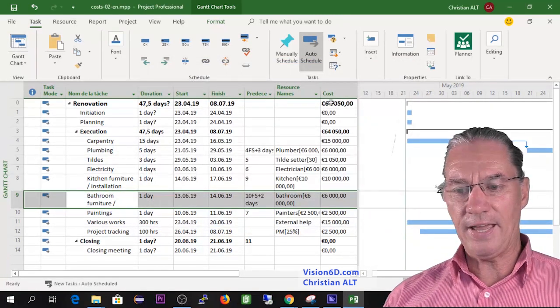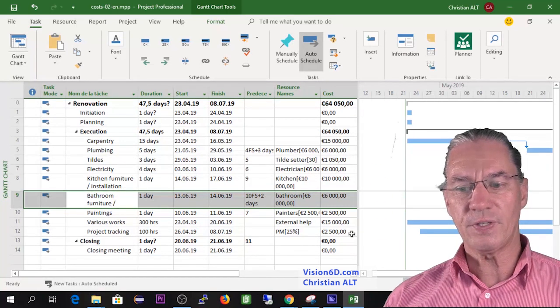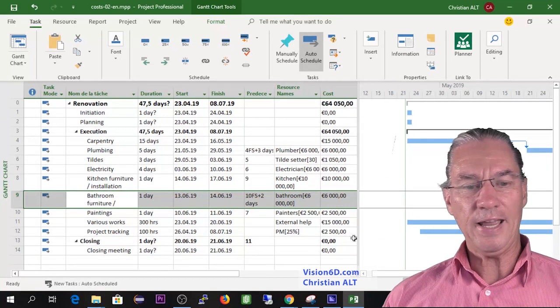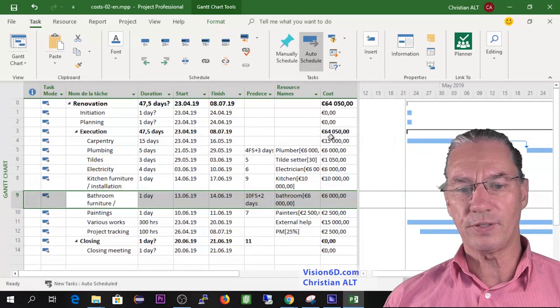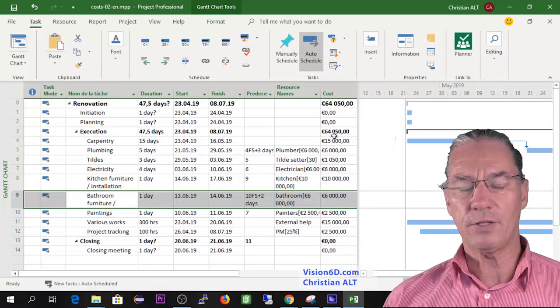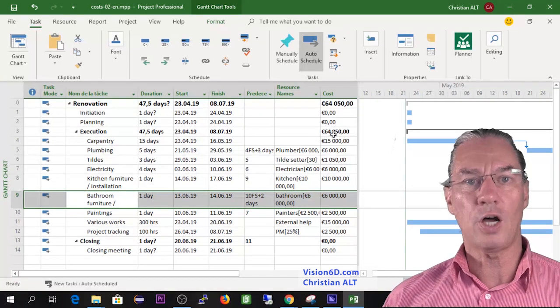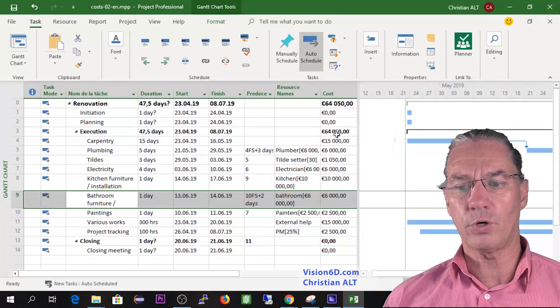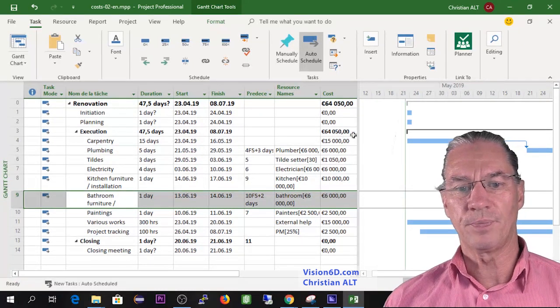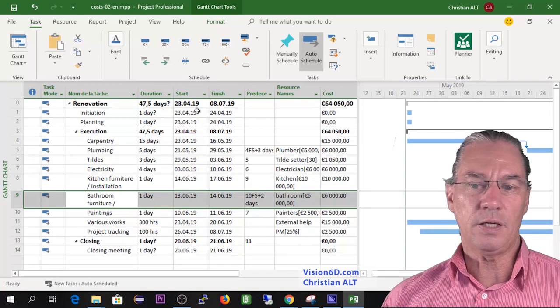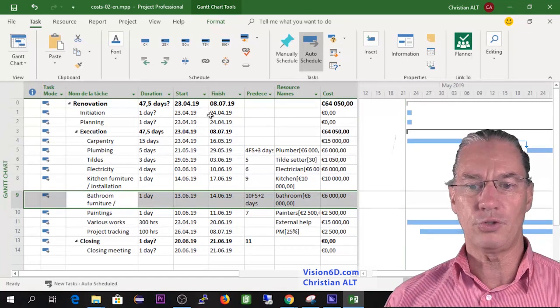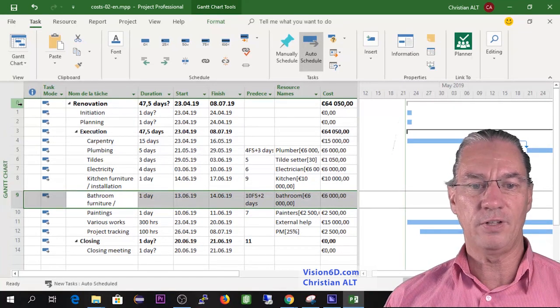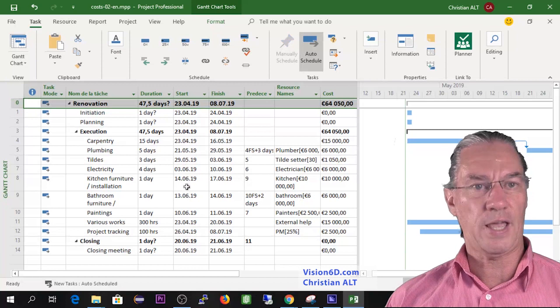I do exactly the same for the resource for the bathroom and here it's 6,000. With that I have completed numbers and I can say that the project for the execution phase is going to cost 64,050 euros, and it's also the cost of the complete project at the level of the summary task.